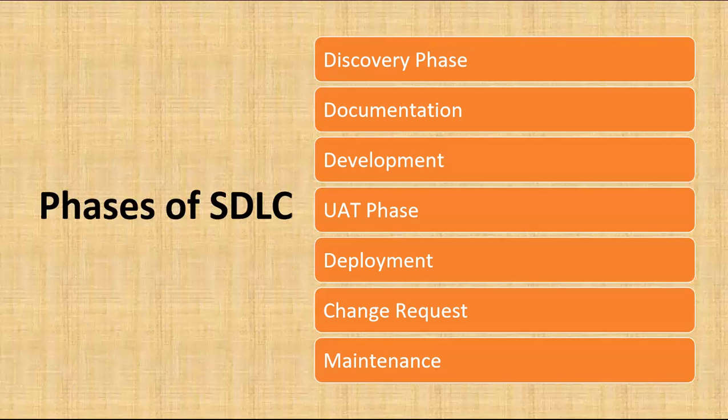That is something. And in the development stage, your developers are doing the development of the robot which you have identified as a process automation. So what you do again in the BA? My recommendation in the development also, don't stay idle. So what you do is track how the development is ongoing, what we are achieving today, what we are achieving tomorrow, and what we are achieving this week. So set expectations to your business team, or set expectations to your technical team. And weekly take your update from the development team, and update to the business team.